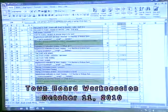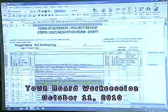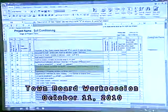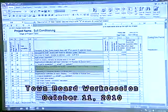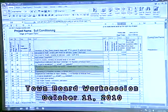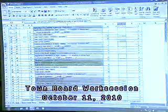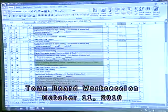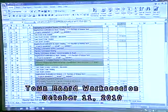And you said you did another example as well? This one was soil conditioning, which Parks is doing for the trees. And we have the staff development and then review direction by the town board. And then the engineering design work back to the town board for review and discussion. It's similar to the Rock Creek Underpass, and bid to work, and then award of the bid. And that would be pretty different from what we might do, for instance, for Town 9. Right. Yes. We would have a lot more of these steps.